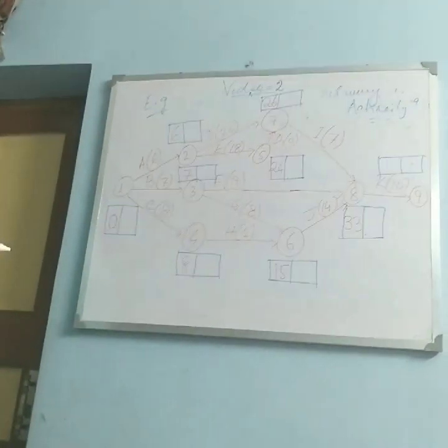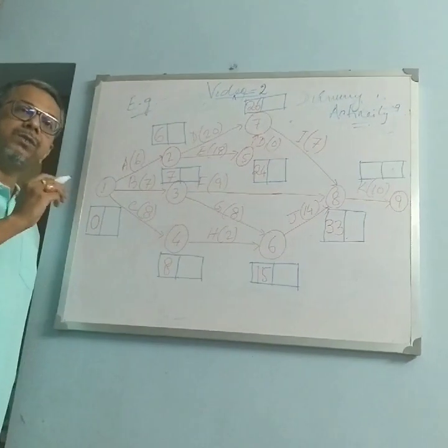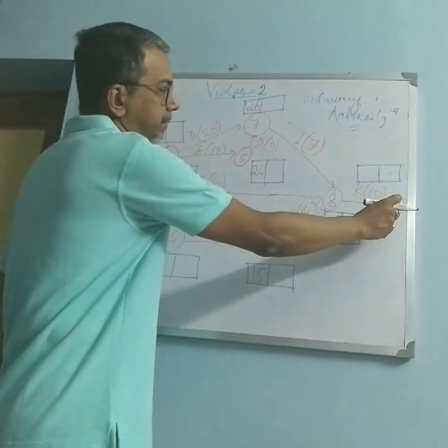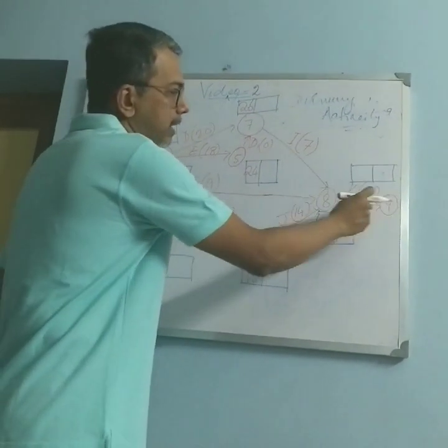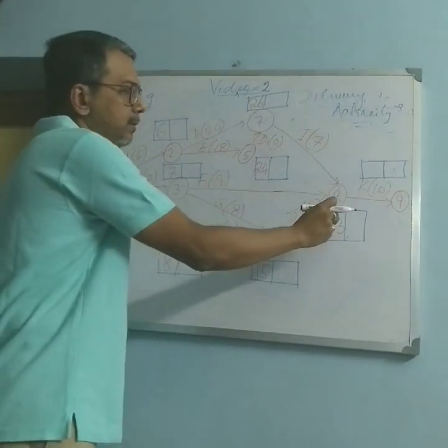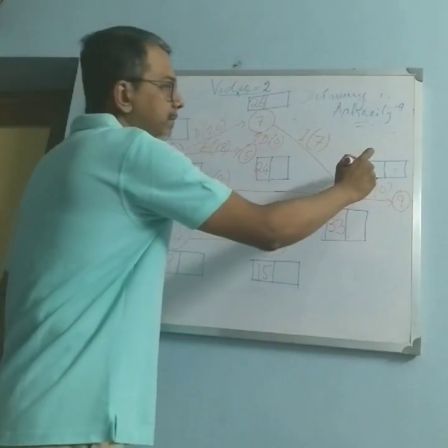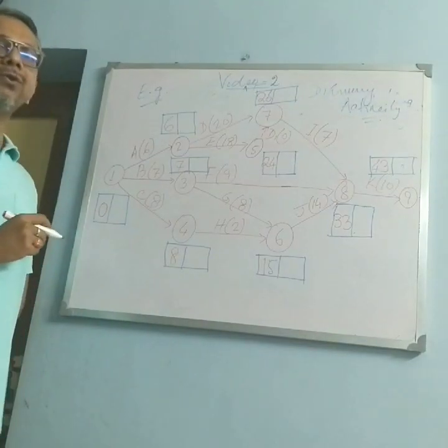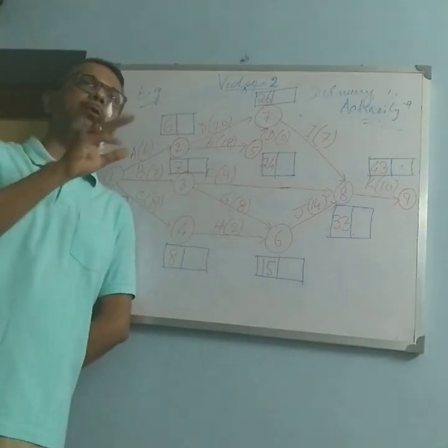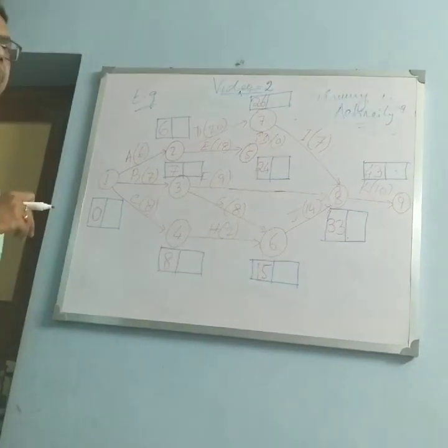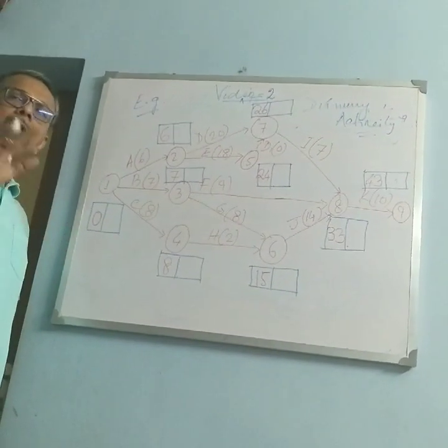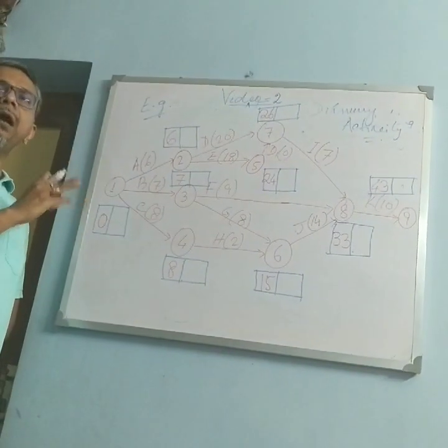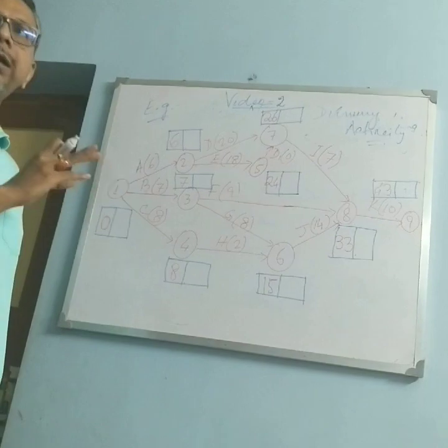So till node 8 we have calculated the earliest start time. Next, here you see the last node is 9 and here only one arrowhead is coming from 8. So 33 plus 10 will be simple as 43. Now what is this called? It is known as forward pass calculation. Now we have done all the EST, earliest start time.